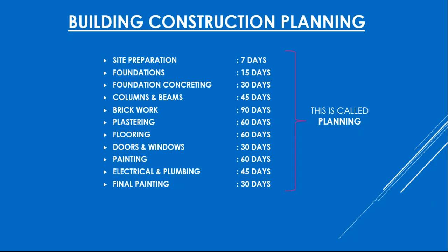Once this planning is done, the same thing will be incorporated in the Microsoft Project software. From that point onwards, you have to do a lot of things, like giving the relationships between the foundation and foundation concreting and subsequent tasks. And also you have to allocate the resources. Resources means, to dig a foundation, you need a JCB and some two laborers. So these are all the resources. And materials also you have to allocate.